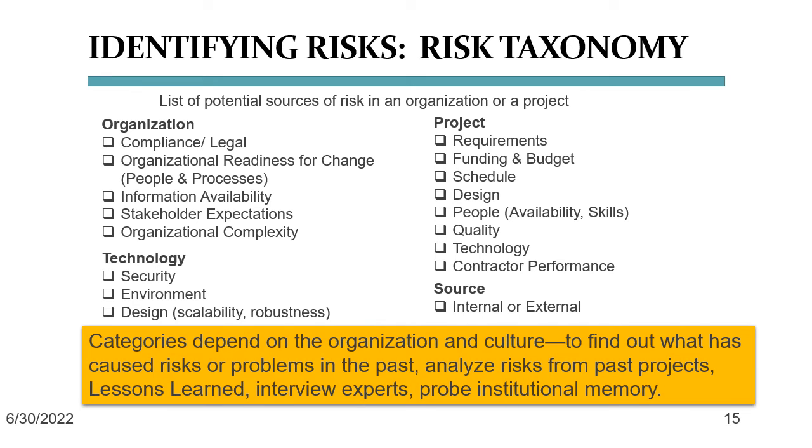Risk identification, which starts in the planning phase but continues throughout the entire project, is a tough job. That's why it is so important to have an idea where to look and which questions to ask when you need to make as many risks known as possible. Because remember, having risks on a project is a very good thing. It means you're looking for any possible traps you could fall into and you're preparing to handle them. That's why good organizations have a risk taxonomy as part of their project management methodology. Here's an example of one. It lists many of the areas in which you want to ask these 3 questions, what, why, and how, to find the things that could potentially go wrong and prepare for the just-in-case situation.